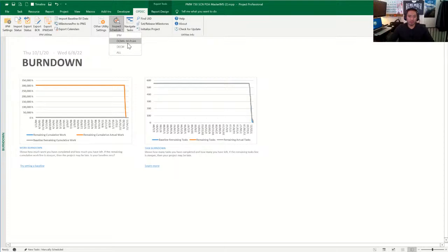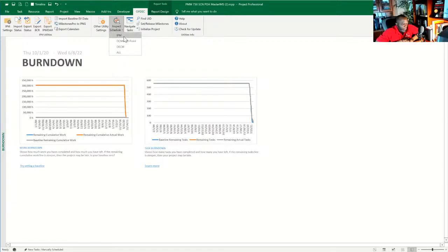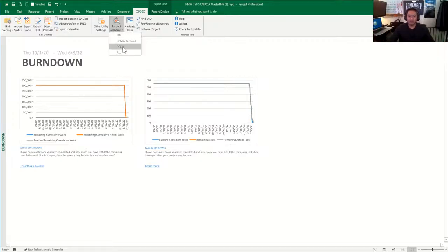You have your DCMA 14-point metrics, which is the metrics that we use in the DoD environment that keeps our schedule on track and helps identify those types of errors. IPM is more for other government types of environments, along with the DECMs, but they all tie in together, and it all depends on where in the government environment you're at, pretty much.